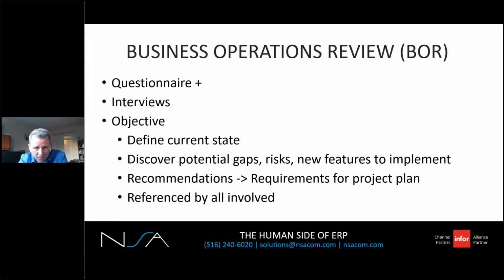So a BOR, or a business operations review. Typically a BOR is offered by your consulting company. At a minimum, it's an extensive questionnaire with supporting documentation. The results could be 60 to 100 pages covering each functional area of your business. But ideally, it's more than a questionnaire. It's also a process involving interviews with champions of each functional area in the business.